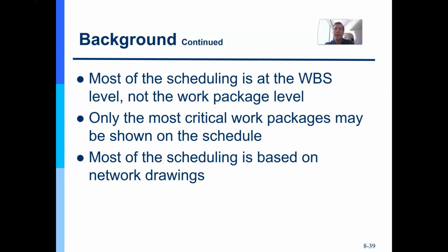Now, most of managing it will come through, we'll start with a work breakdown structure, which is all about scope, but you will decompose that. You'll break it down. You'll decompose it into your activities that support your schedule along the way. And that's how you'll come up with your schedule activities. You're not adding to the work breakdown structure. You're detailing out the work packages in the work breakdown structure for what specific activity do I need. For example, if I need to build bike tires, well, one work package would be front tires and one would be back tires. And from there, that's all I need.